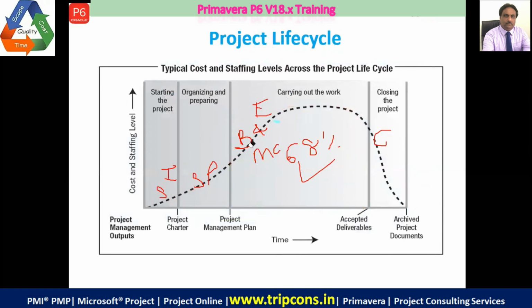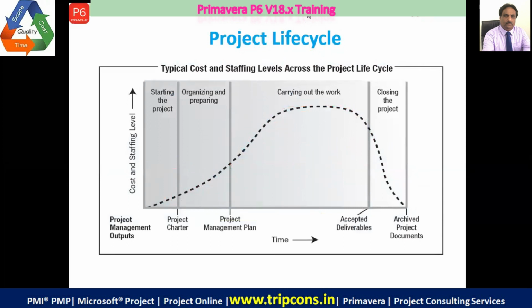Okay, so make sure that if you are doing something, you do it with full knowledge, full scope, and whatever is varying should not vary more than 5%, which is called the acceptable variance. So that's a best practice. If the variance is more than 5%, you would find it very difficult to manage, you will find it very difficult to keep the project profitable, and that doesn't make any sense.